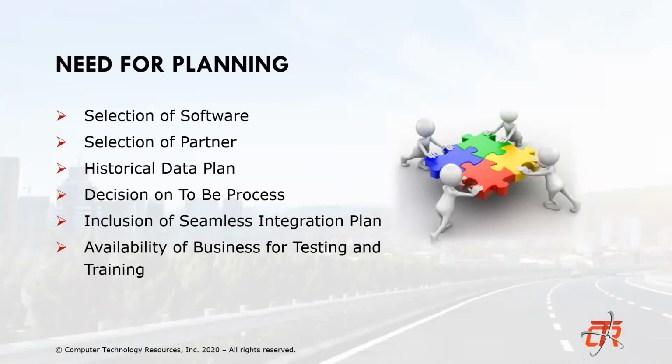Yes, it is. Another thing that was very important is we kept the issues log. Of course, I was the one that maintained that, but I kept an issues log with all the issues that came up during all those various training and testing sessions. And if it didn't work the first time, I made sure we retested. Like, okay, now we're on CRP2. Let's go test that again.